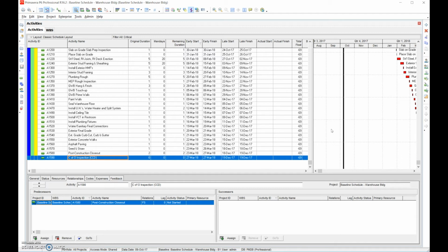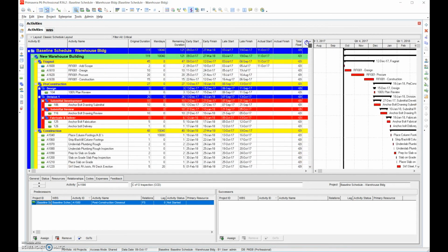So simply we take 69 minus 27, because the 27 is the time that we own of a delay, and we have 42 days. So the client, the government, or whoever the individual would be, now owes us 42 days, because we own the 27 days of negative float because it was our responsibility, and the actual 42 days were a result of the added scope in RFI 001.